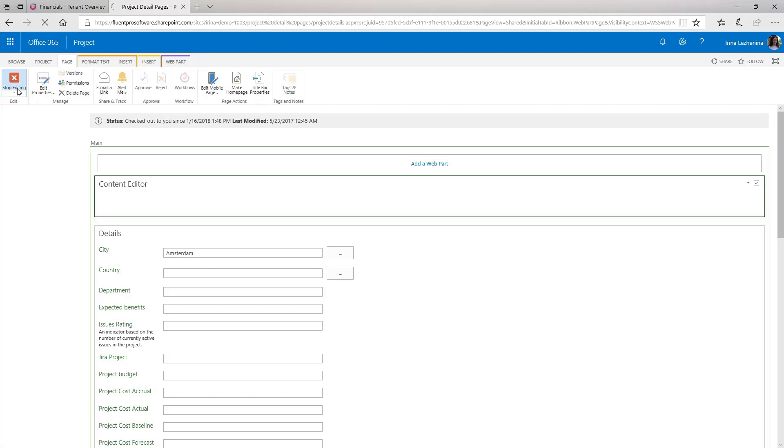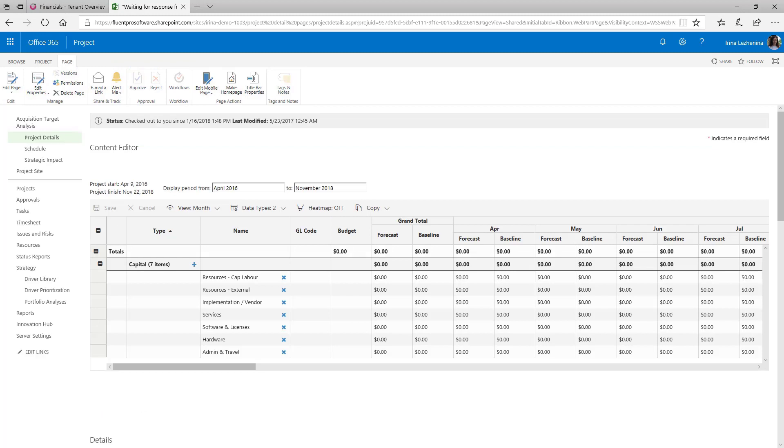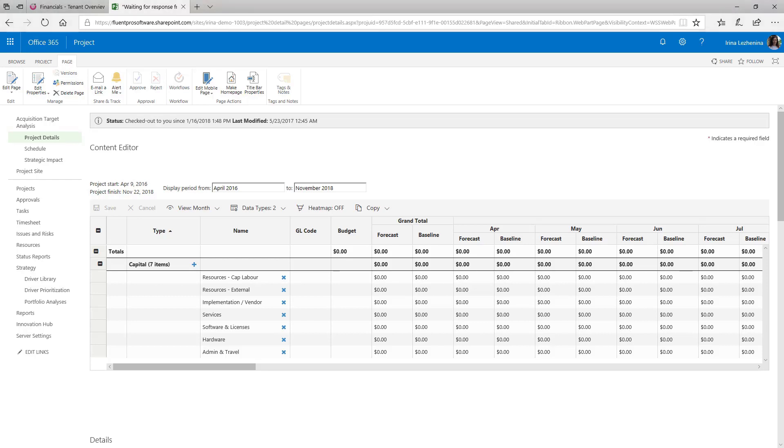Please note that you can add this Web Part to a PDP directly and you can also create a new PDP. In this case, please make sure to add the newly created PDP to the corresponding EPT. And you can then verify FluentPro Financials by opening any project containing the corresponding PDP page. So now you can also create project budget in Project Online directly on the PDP page of your projects.